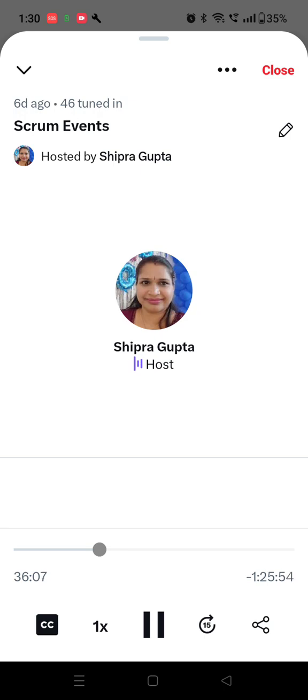So every sprint, it is expected that the team will deliver 100 to 150 story points, or 120 to 130 story points, or whatever way we want to range it out. So that is my sprint velocity. Capacity is how much my team can do in this particular sprint. So let's say the sprint velocity is 125, but I'm having Diwali holidays and my team is not available.